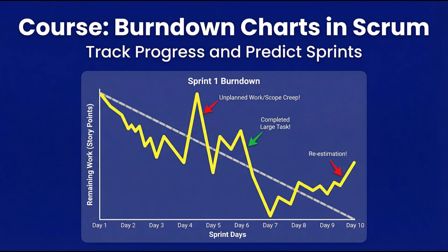Diagnostic questions. What dependencies exist that we can't control? Are tasks too large, creating binary done-not done situations? Do we have too much work in progress simultaneously? Action framework, daily stand-up: implement WIP, work in progress, limits. No one starts new work until current work is complete.